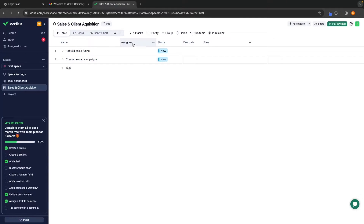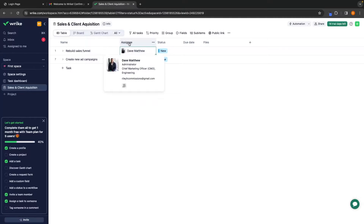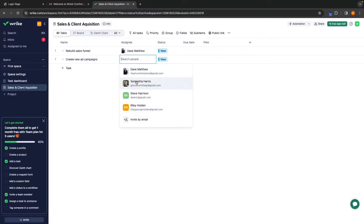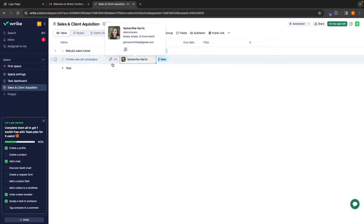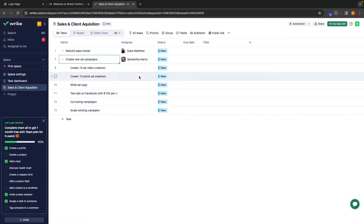Next, I can go to the assignee column and set specific assignees for each of these tasks. If I click into the assignee area, this is going to bring up all of the different team members that I have. So for example, I can assign Dave to this specific task right here — that is going to set Dave as the assignee. Then I can come down to the second one and set Samantha to this specific task. Now each of these people have been set these tasks. I can also click on the dropdown menu to open up all of the subtasks and set specific assignees to each.